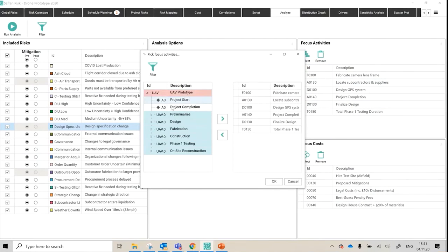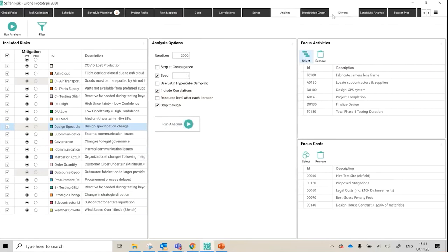This is very relevant to me on my last project where, let's say I had my 16,000 activity schedule, the contract had 70 key date milestones which were contractual, and then of those 70, maybe 20 of them were tangibly important or agreed as the most important ones. So I might want to create a little short list of those 20 in here, without having to memorize all of the ID numbers and references from the schedule itself. This creates a little short list, which means later on when you explore, it's easier to track.